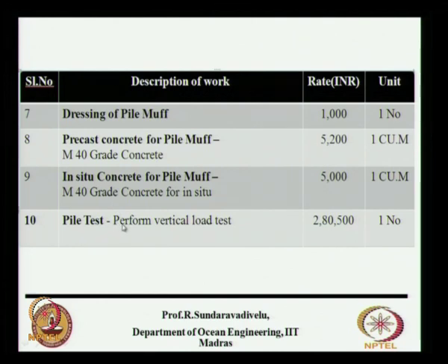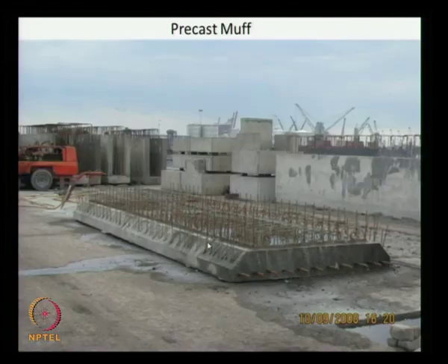Then we do the pile load test. For that also we have to indicate the cost. The number of pile tests will vary depending on the number of piles. It is some percentage of the total number of piles to be tested. If we do a low strain integrity test, that also can be included.